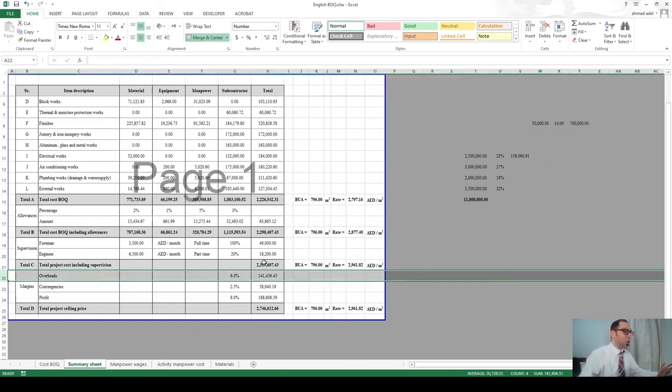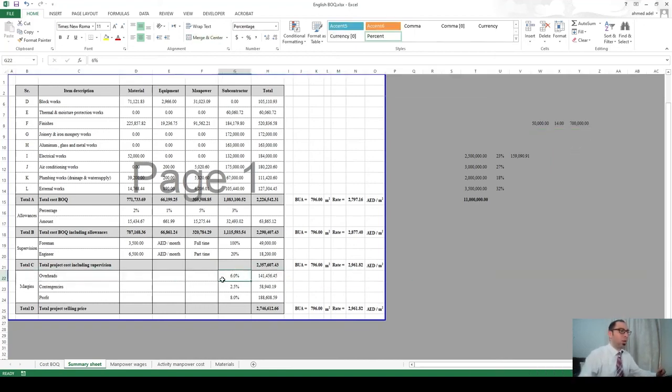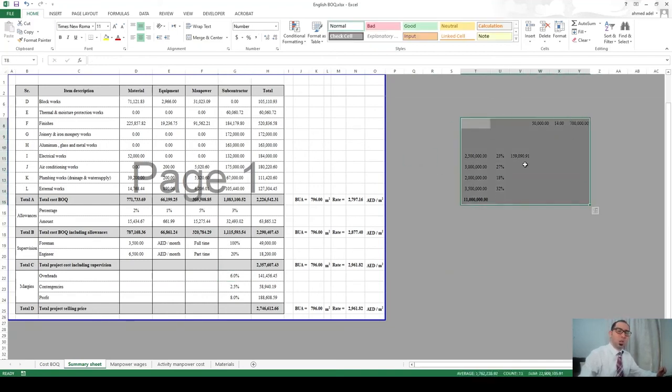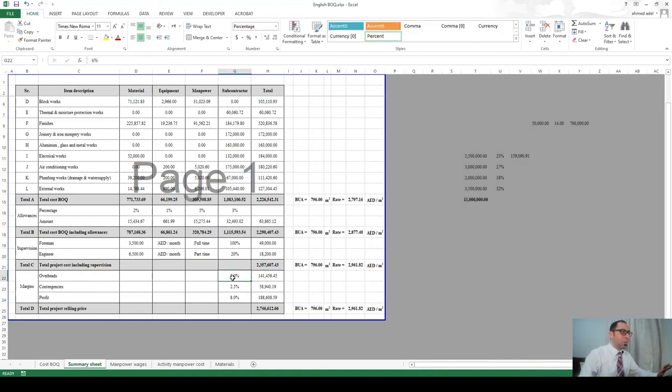And this is the definition of overheads. And this is how we calculate the overheads. Usually nobody is doing that, guys, but I did this just to show you how it is done. But sometimes, or most of the time, they calculate the overhead as something from 6 to 12%. It depends on how many engineers you have in your head office, how many draftsmen, how many office boys, accountants, and secretaries, and all these people who are not directly loaded on one of your company projects.